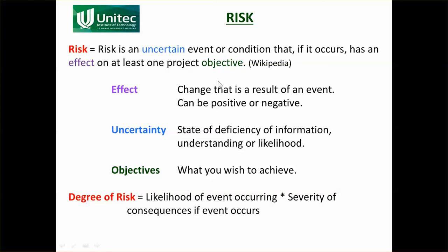In this case, it'll affect time. It probably affects cost as well. So the effect is a change as a result of the event. So you were hoping to work on Monday, but it's raining, so therefore you can't. So that's the effect. It may be a negative effect. A positive effect could be it didn't rain in the whole project. You anticipated it was going to rain, you'd planned for it to rain, but it didn't rain. So that's a positive effect, meaning you had more time to do the project.